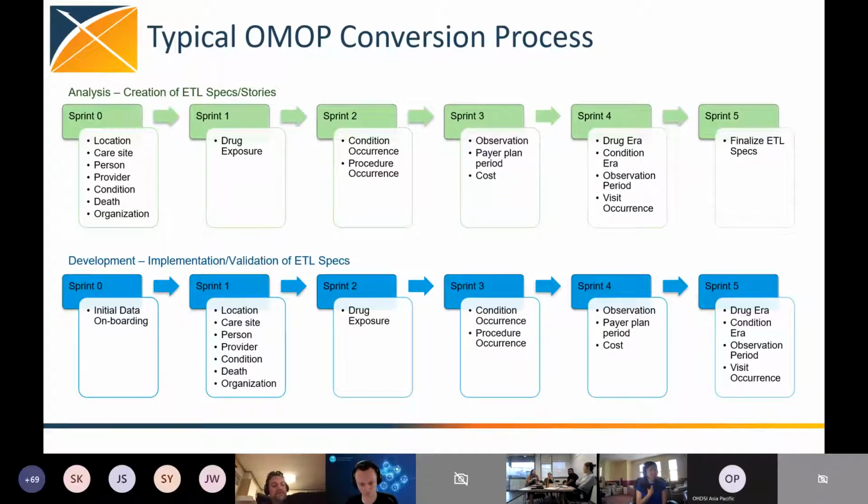In my group, our teams are 100% allocated to the effort. And it really depends on your team. If you don't dedicate them 100%, then their story points just have to be based on the percentage they are allocated. There are times when my teams are not 100% allocated, so then we would just say they're 50%. Then I only give them 50% of the story points that they should have. Again, I can go on a long time about how to implement Agile Scrum.